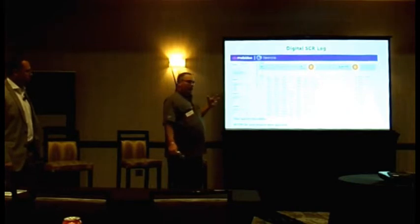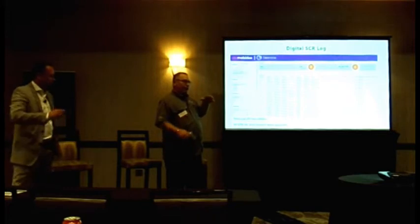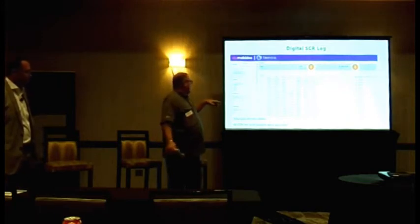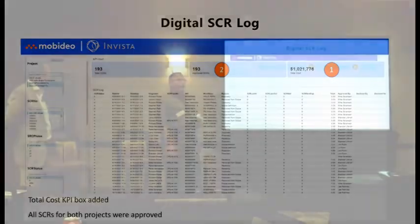Then you do scope challenge on all the scope, move stuff out, move it in, and you put an SCR in for anything removed where you document, hey, it wasn't truly turnaround scope, that's why it got removed. L2s is anything from scope freeze to full fund DMF, final DMF. L3 is from final DMF to the begin of execution, and L4 is your execution scope.